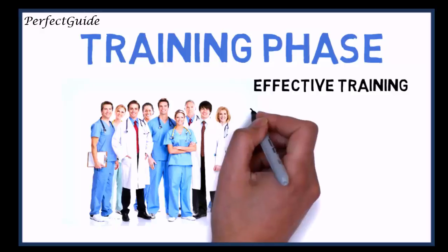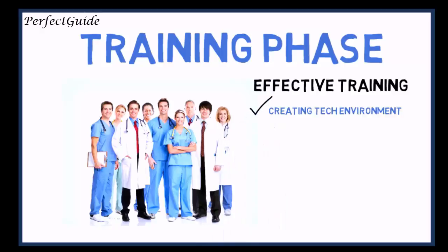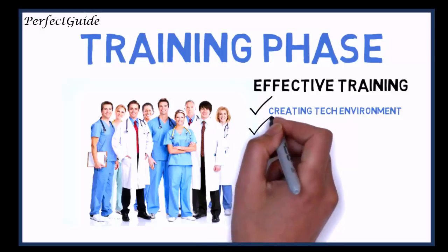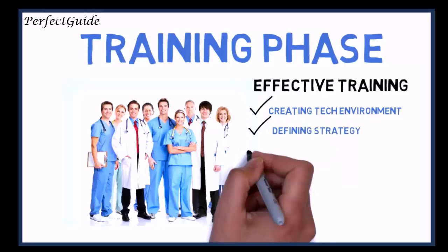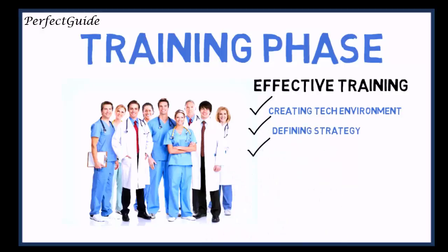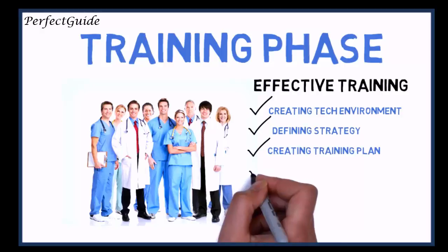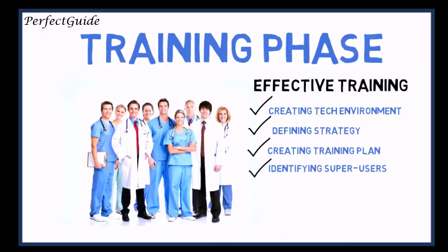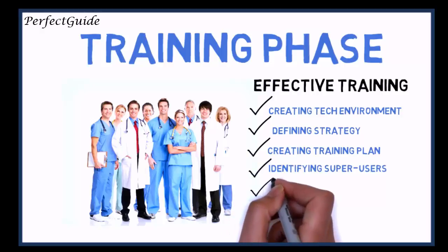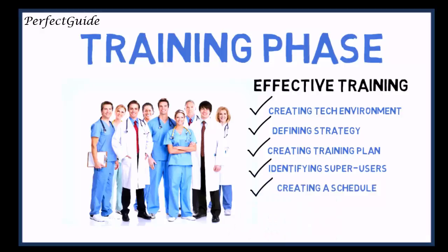Milestones and important activities of this phase include creating the training technical environment, defining the training strategy and approach, creating a training plan, identifying super users, creating a training classes schedule, and assessing and reporting go-live readiness.